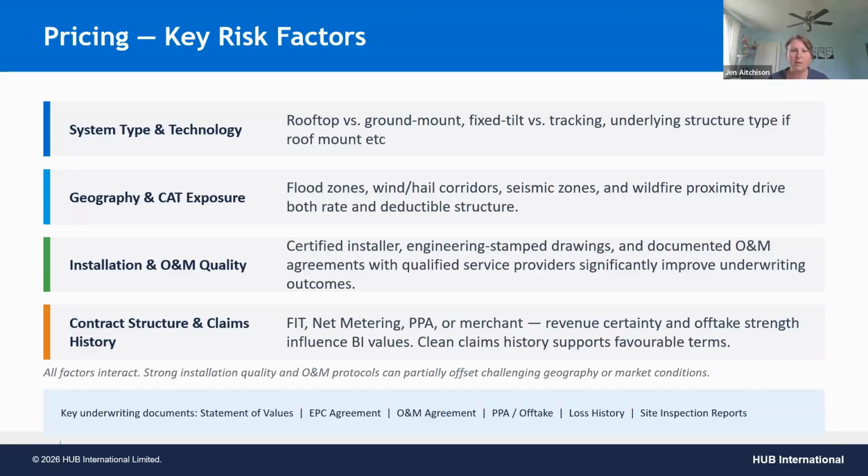Who's responsible for what, indemnities that you're taking on and what you're offloading. So are you keeping environmental indemnities or are you pushing environmental indemnity off to, say, a subcontractor that's doing site grading? We've seen pollution events and claims come up where a solar farm was built on rolling hills and there was a water event. The site wasn't graded properly. Silt ended up in a nearby farmer's pond, and it was $4 million worth of cleanup. Making sure that the environmental indemnity is in the right place is key, among other indemnities.